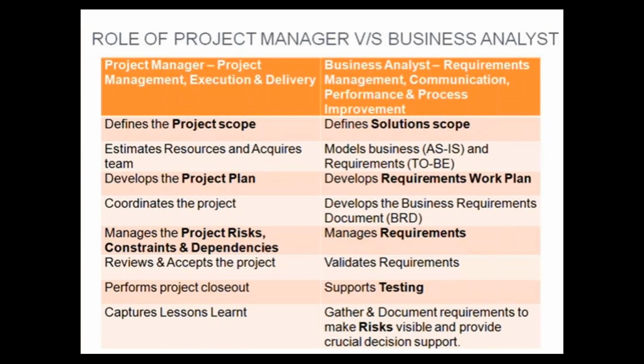If there is a server failure, there should be an alternative server on which the development is carried out. You can't say the server failed, we have the technician looking into the server, and the whole day we have 20 resources spending their time looking at the computer, with absolutely nothing to do. 20 resources, 1 day, 8 hours of work. How much is the billing per head? What is the billing that's going to go out? And you can't say, because the server was down, you didn't do any work, please come on a Saturday or a Sunday and complete your work. No, employees are not going to agree to that because they are ready, they are available, and they're ready to work. If it is the problem of your computer or a server or system or infrastructure, it is not the problem of the employee.